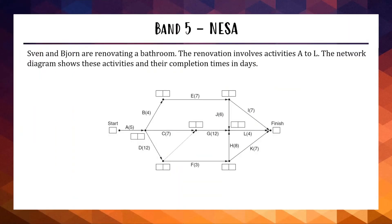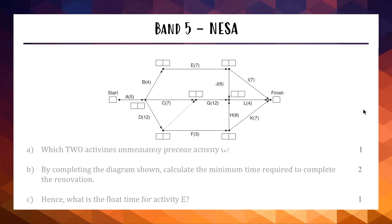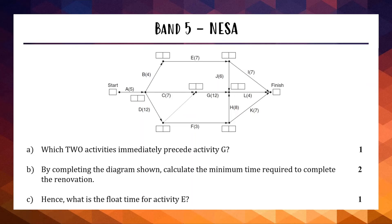We're up to the band 5 one. We've got Sven and Bjorn are renovating a bathroom. The renovation includes activities A to L and we've got a network diagram showing the completion times of all the activities. This is a critical path question with boxes for forward scanning and backward scanning. First question: which two activities immediately precede activity G? Activity G in our diagram is right here. We can see C leads into G, but what's this dotted line mean? This is a dummy line and this means that D is also an immediate predecessor for G. So the two activities that are right before G is the C and the D.